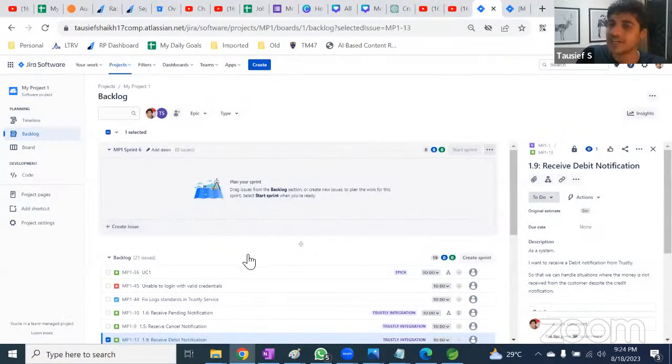And then you all start discussing, oh, for this feature, how much time will it take, what do we have to do, what work on the front end, what work on the back end, what work on the database. You get into more details about all of these things. Now, once you're getting into all these details, you might know, oh, this ticket might take 4 days to complete. This might take 2 days. This might take 1 day. This might take like 10 days to finish.